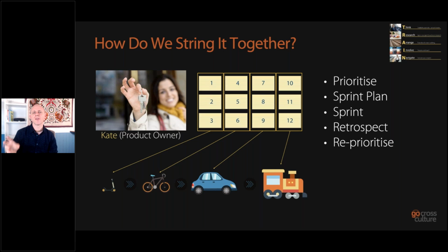We have an understanding of where we're headed for this project, and we've probably got a budget on it anyway. So you can say, well, we think it's going to be 6 months, but we can't commit to that completely. And this is the difficult bit, and this is where people may start to laugh at you, because you're like, well, hold on, you just told me it's going to take 6 months to deliver, but you can't completely commit to that date. Yes, it's a broad estimate because we're using Agile. And then they'll say, well, we want a concrete estimate.